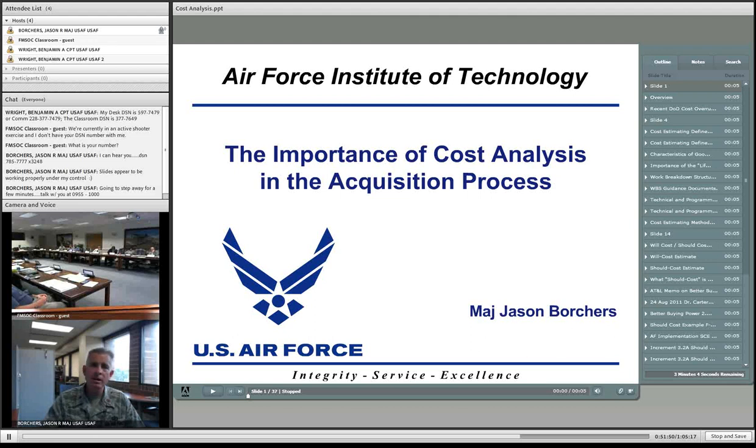So you still need to come up with a cost estimate to support actually operating and maintaining that item. When you look at the fundamentals of cost analysis, it's not that different. You're still doing the cost estimate. You're still choosing one or more of the 5 methodologies. It's just that, of course, O&M is typically going to be 3400 funds.